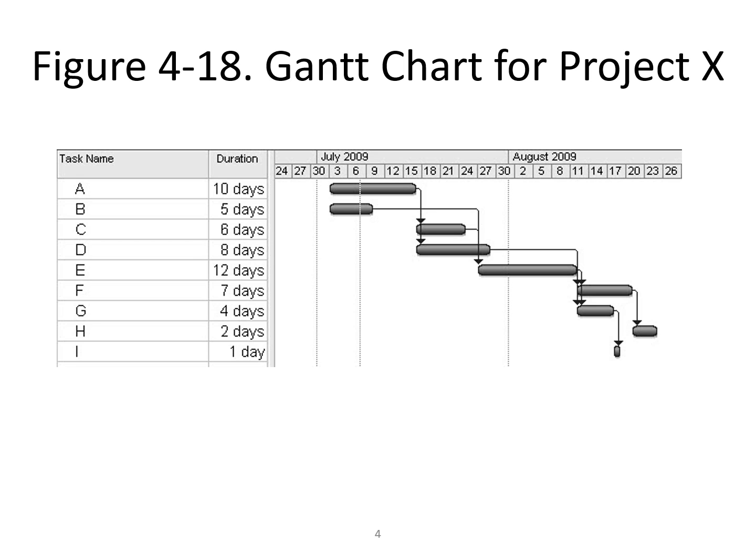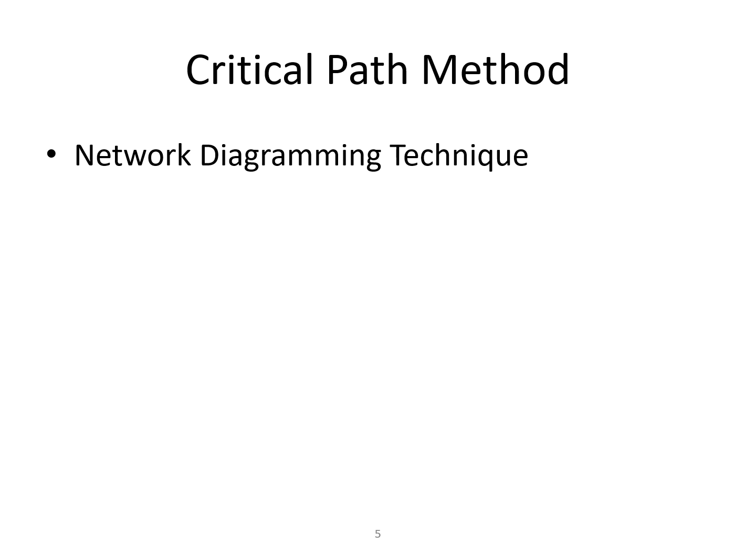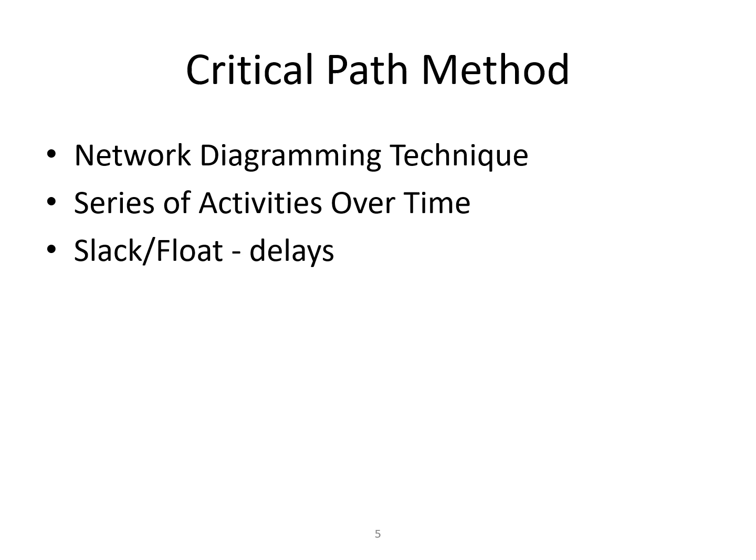A more powerful tool is to use the critical path method. Critical path method, also called critical path analysis, is a network diagramming tool used to predict total duration. A critical path for a project is a series of activities that determine the earliest time which a project can be completed. It is also the longest path throughout the network diagram and has the least amount of slack or float. Slack or float is the amount of time that an activity may be delayed without delaying a succeeding activity or the project finish date.